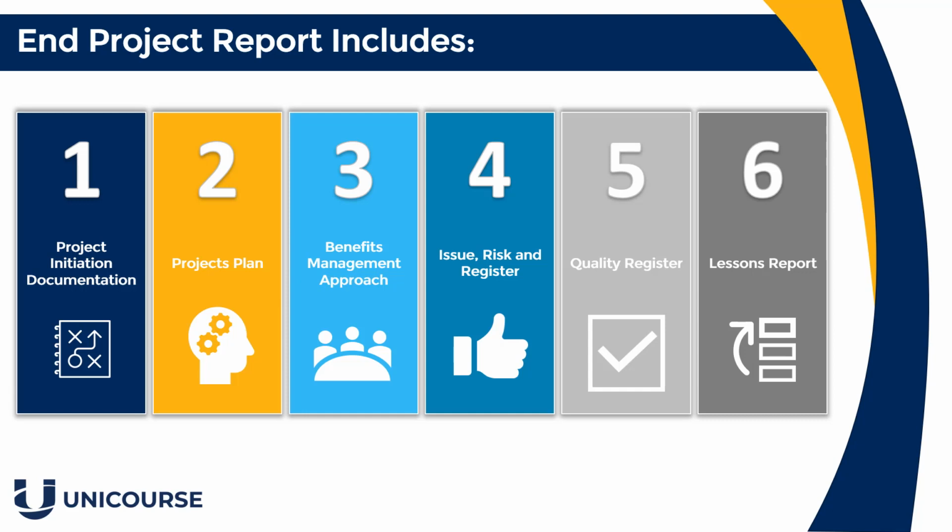Quality assurance, the quality register, is the planned activities implemented in a quality system, so the quality requirements will be fulfilled. Now, this might be one of the key objectives for the stakeholders, so it's important that you do keep an eye on the quality requirements, as it could be a legal requirement or an industry requirement. There are two ways of achieving this: by using a process checklist or a project audit every couple of months.